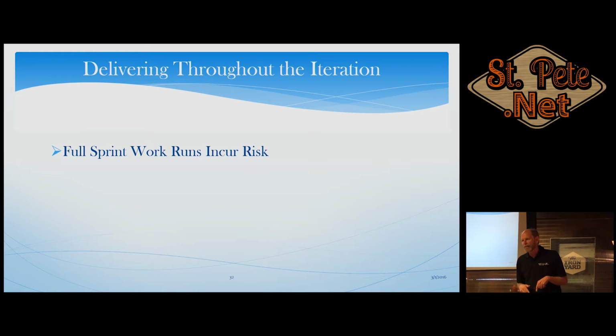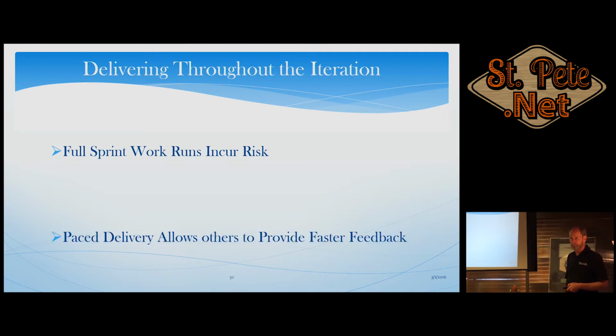And then something that doesn't happen down here, but I'm from New York. We relocated down here a year ago. I'm from New York. You get a snow day or 2. And every single user story fails to meet because you lost a day in the middle. Well, they call a corporate meeting. I mean, there's many things that can block you. If a work run, I mean, that's from start to delivery of a piece of value, is going to take your full sprint, you have a lot of risk because anything goes wrong, you're going to miss it.